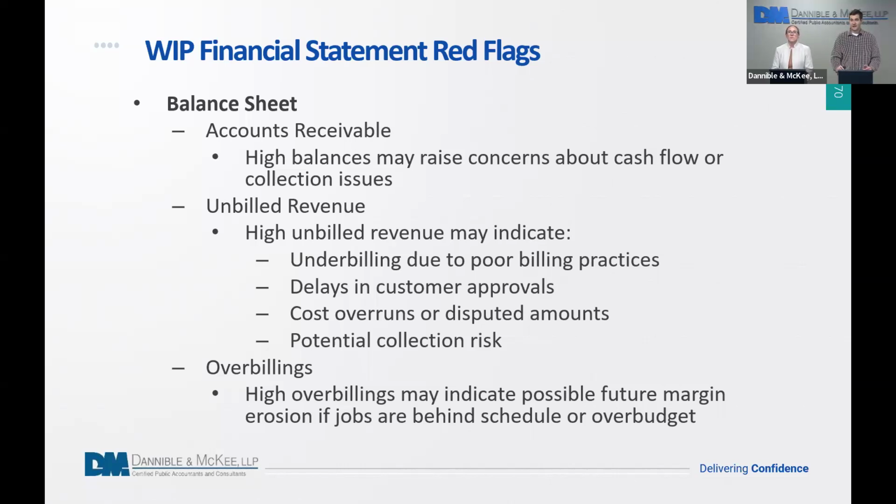And then overbillings. High overbillings generally aren't a good thing either. It's great that you collect the money up front from the customer, but it's still a liability to the company. You can't spend that cash on another job or use your discretion on what it's for. If a customer has given you that money and you're liable because you haven't yet performed the services to earn it, you need to have that cash on hand until you start spending it on the costs associated with the contract that the overbillings are related to.